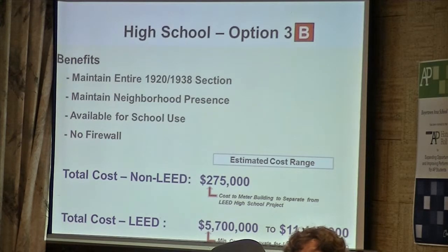At least, it takes about a year, maybe 6 months of planning. So you have some time to work with community groups, or depending what you chose as a board, how you want to look at using this building. But you probably need 6 months to a year of design and planning before you are ready to start construction. A little bit of time.